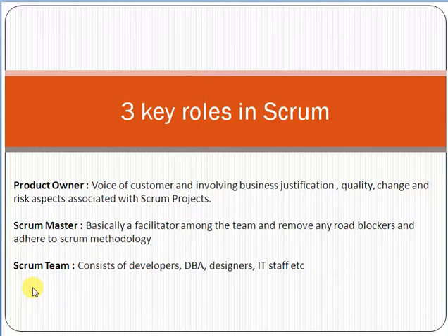They are not dependent on any person. The whole Scrum team is responsible and self-driven. Self-driven means that they are making their own decisions according to their own knowledge. And one more important thing, the Scrum team takes decisions among the team. What does that mean? It means that the Scrum team members sit together and decide that, okay, these 5 stories will be picked by these developers and these 2 stories will be picked by these two team members.